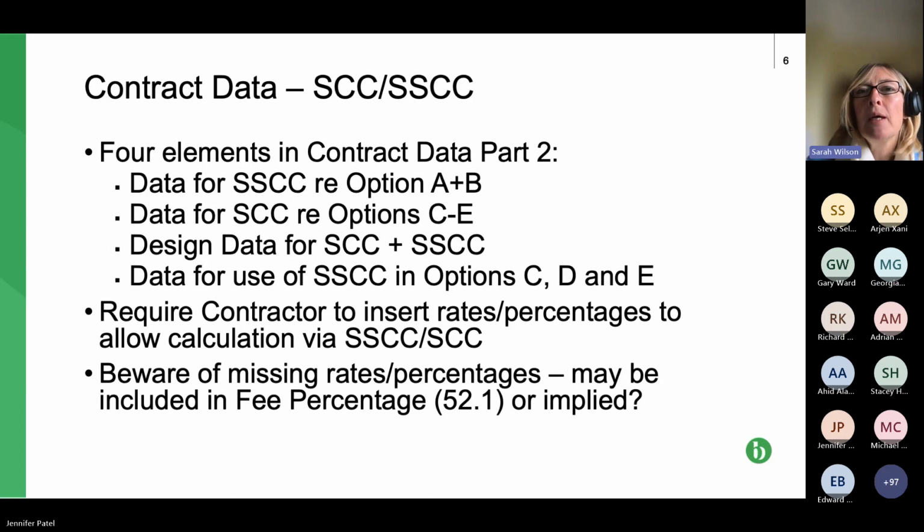Be careful, so that you ensure you don't miss any rates and percentages, or you end up struggling in the scenario that I described, where how do we calculate something if there's a blank? So, if the hourly rate is blank pounds per hour, that's going to be £0 per hour. If the percentage is blank, not filled in, it's got to be 0, hasn't it? So just be really careful with that. Next slide, please.